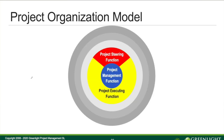The organization model — we symbolize it like this, which could be a stakeholder map. We have the steering function of the project — the governance board, steering group, sponsor, and project portfolio owner. We have the project management function with the project manager, project planner, etc. And we have the project executing function — the people that are really doing the work: designers, testers, construction workers, or whatever we have in our project.